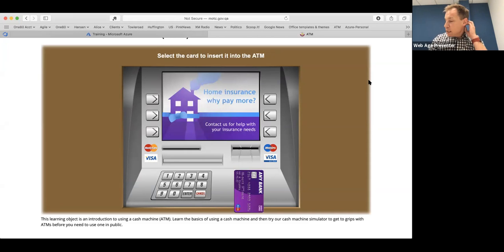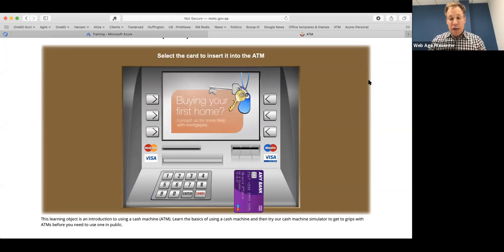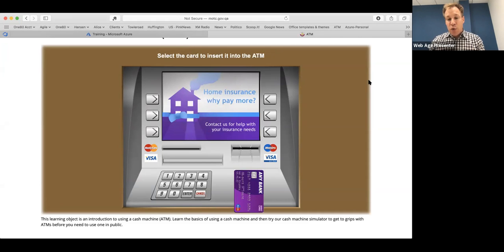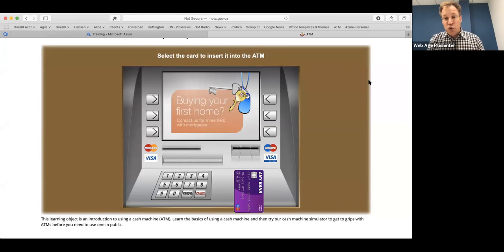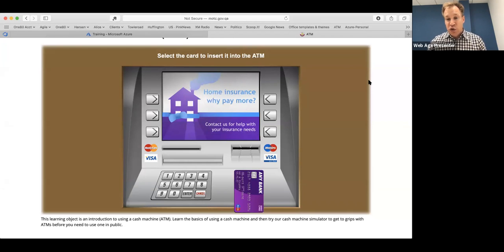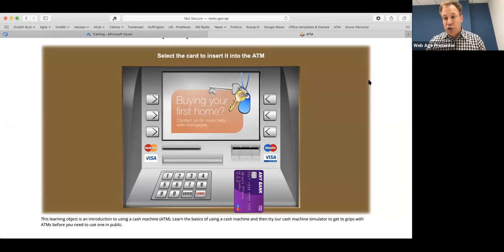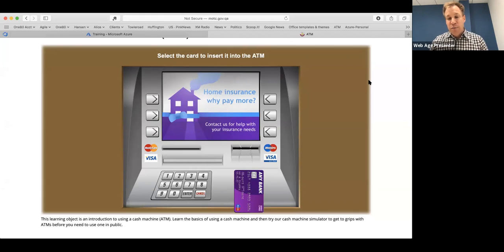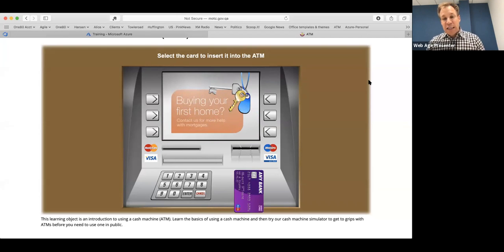The thing that we sometimes get bogged down in when we're defining requirements is we start talking about the minutia, which is important, but really what's important in the end is, are we meeting our customer's expectations? If they can do these things on the screen, that means all of these things in the background have to have worked. The validation procedure has to have worked. The counting mechanisms in the machine had to have worked in order to dispense money. So if we accomplish this one piece of customer functionality, these minor functionalities underneath have to work also. So we are actually writing test cases at a higher level now in order to make sure that the lower level works.